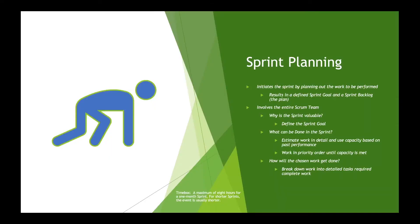Sprint planning is the first event within the sprint. For a one-month sprint, sprint planning should be limited to a maximum of eight hours, and for shorter sprints the event is usually shorter. The entire Scrum team is involved with sprint planning, meaning that the Scrum Master, the Product Owner, and the developers all participate in the event.